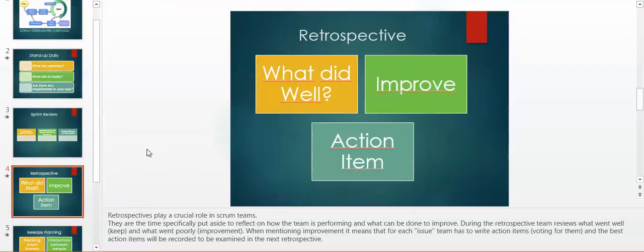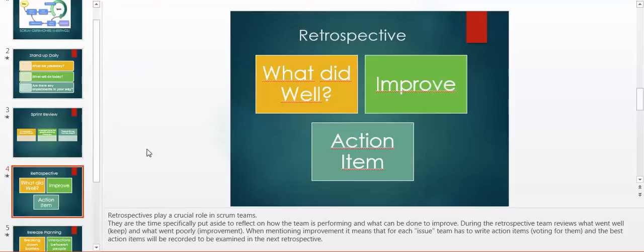Another scrum meeting is retrospective. Retrospectives play a crucial role in scrum teams. They are the time specifically put aside to reflect on how the team is performing and what can be done to improve. During the retrospective, the team reviews what went well (keep) and what went poorly (improvement).